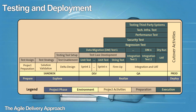There are several testing activities involved in an agile project, occurring in different environments depending on the phase. Every project differs, and so does the test strategy, which is delivered in the explore phase, reviewed by the functional and technical teams, and approved by the test manager, project manager, and client manager. In the realize phase, the project team might carry out unit testing during the build and integration sprint in the development DEV environment. String testing might be executed during the firm-up sprint in the quality assurance QA environment, and user acceptance testing UAT in the QA environment may follow integration testing. The test strategy will also identify data migration and performance testing requirements, including the environment and how testing data will be created and updated.